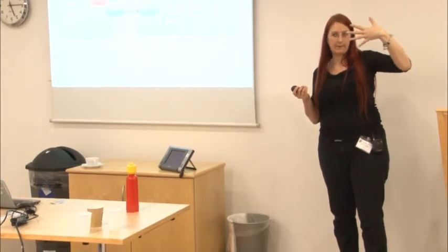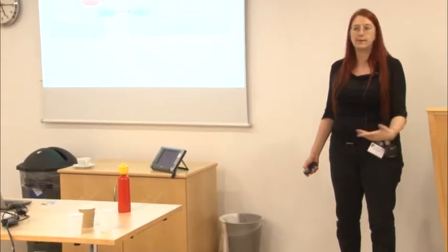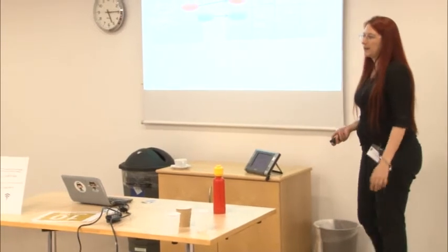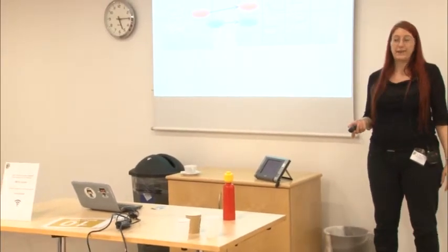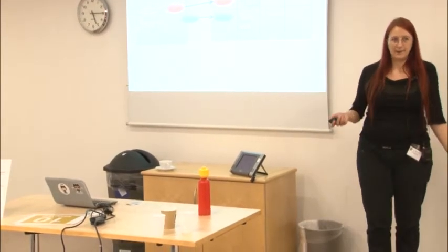Yeah. So that 5-point scale, plan everything. The other lovely thing about the 3s is you know you need expertise, so you can make sure you have access to the experts. If you need to schedule outside experts, you can make sure you do that. And it's a nice explicit way to do it. I never worry about 2s and 1s. 2s and 1s can be offshored. User registration.